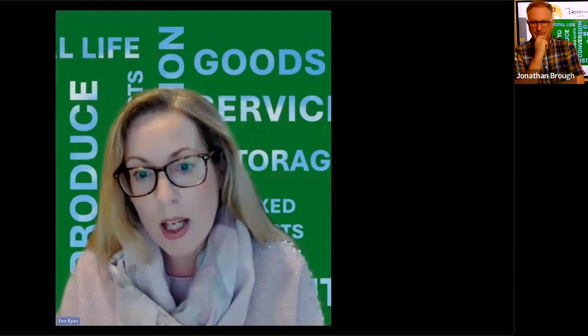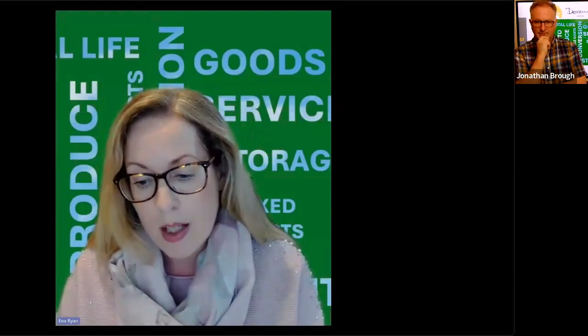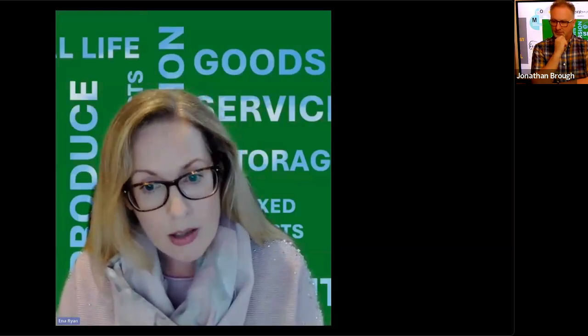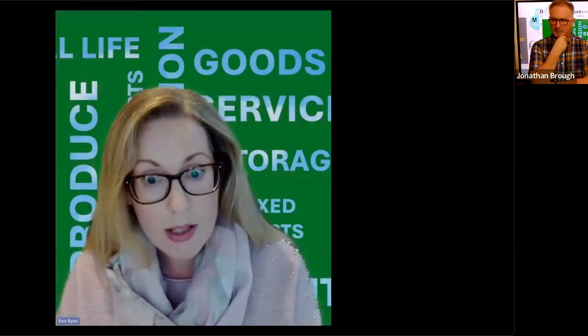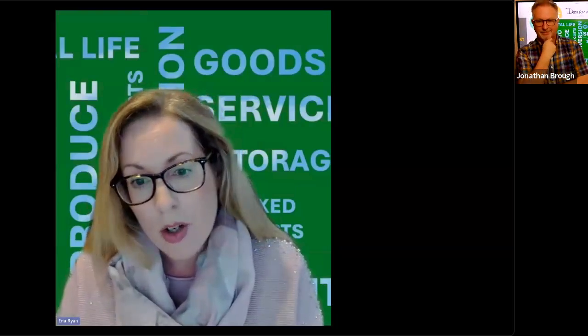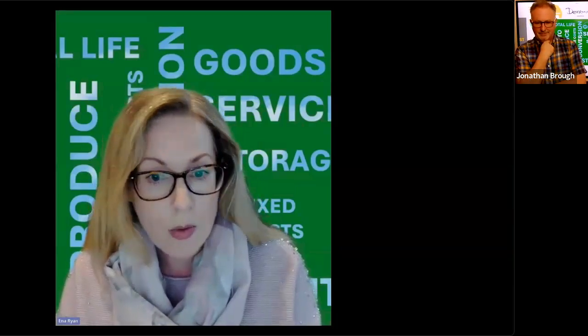How much attention we would get, how the account is managed, that we have a contact person, that the supplier is responsive and replies urgently to any issues that we have. Another one then, if we're talking about products, another selection criteria would be capacity in the factory, lead times, how quick the lead time is. That's really, really important at the moment for us. Also, if they would offer to hold consignment stock, that is really important because that then helps on our working capital.